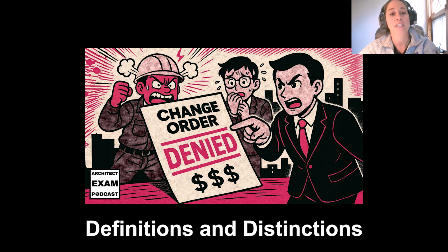They might involve multiple claims bundled together and may require more formal processes as defined in the definitions of the contract documents. It's also important to understand what a claim is not. A claim is not simply demanding money or services without a contractual basis to follow it up with. A contractor can't just blindly demand payment without going through proper paperwork and processes, and an owner can't demand additional architectural services without revising the scope of work and the contract with the architect.